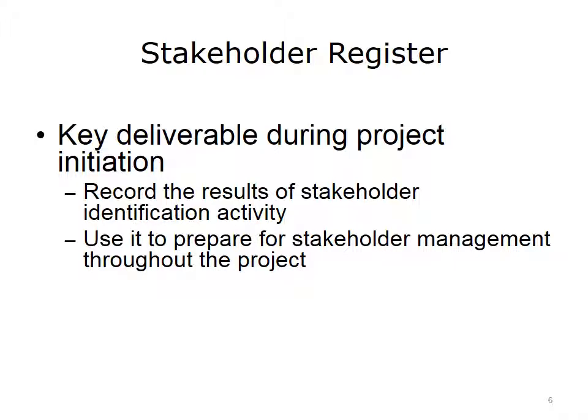The Stakeholder Register is a key deliverable during project initiation. The key activity so far has been to identify the stakeholders, recognize the possible roles they will play in your project, and understand the incredible range of possibilities for individuals involved in the project. When you have identified stakeholders and their responsibilities, capture that information and record it in the Stakeholder Register. These documents should be electronic documents that are easy to revise and keep current.